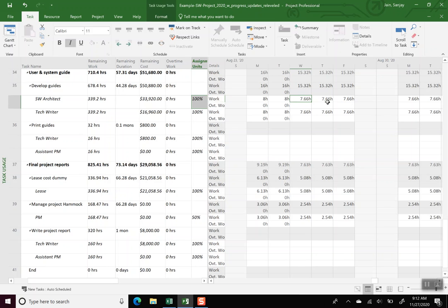That's what these numbers reflect: the duration is longer, but each day we are only accomplishing 7.66 hours of work. These variances do interfere with the calculations, as you'll see shortly. But we are looking for getting close to the numbers we have calculated outside of Microsoft Project in Excel.